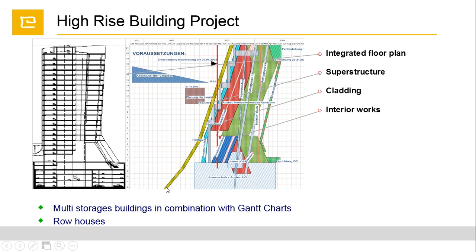These activities have all productivity rates, and in different distances, different locations, the slope is changing. This gives us an idea of at which level we will be, and when. So there are two answers: at which level, when. This will help us, and different colors will indicate different disciplines. This way, we will be able to easily analyze our disciplines to complete on our projects.